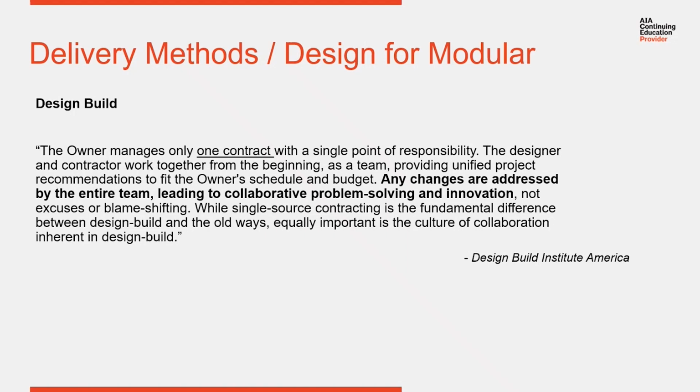Design build is an interesting concept, and we're seeing more and more use of design build on projects. It's a concept that the owner and the architect and the contractor are all working as a team as a project is being developed. And the general contractors typically have representatives from the major trades working with him. So all the stakeholders in the building are working at one time as the building is being developed, provide input and guidance to the design team. So they're getting recommendations in real time on the best approaches, the best products, the best ways to do it, to provide material on the project.